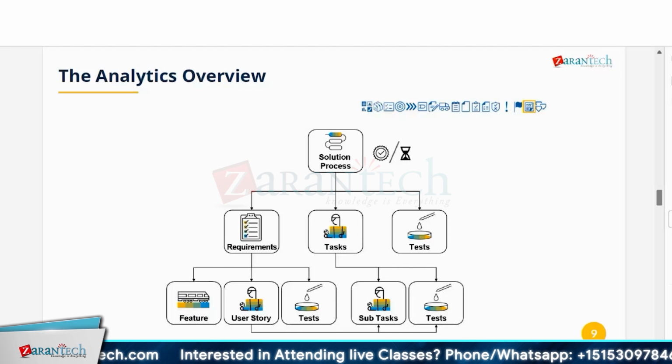But after that you'll do the actual scoping. We have decided we're going to use Ariba, SuccessFactors, S/4HANA public cloud, but based on the customer's requirements, which business processes will be part of this scope? You're not going to use all the business processes. All customers can't and will not use all of them. They would have a specific requirement, maybe for the whole enterprise, but they might not have some processes.